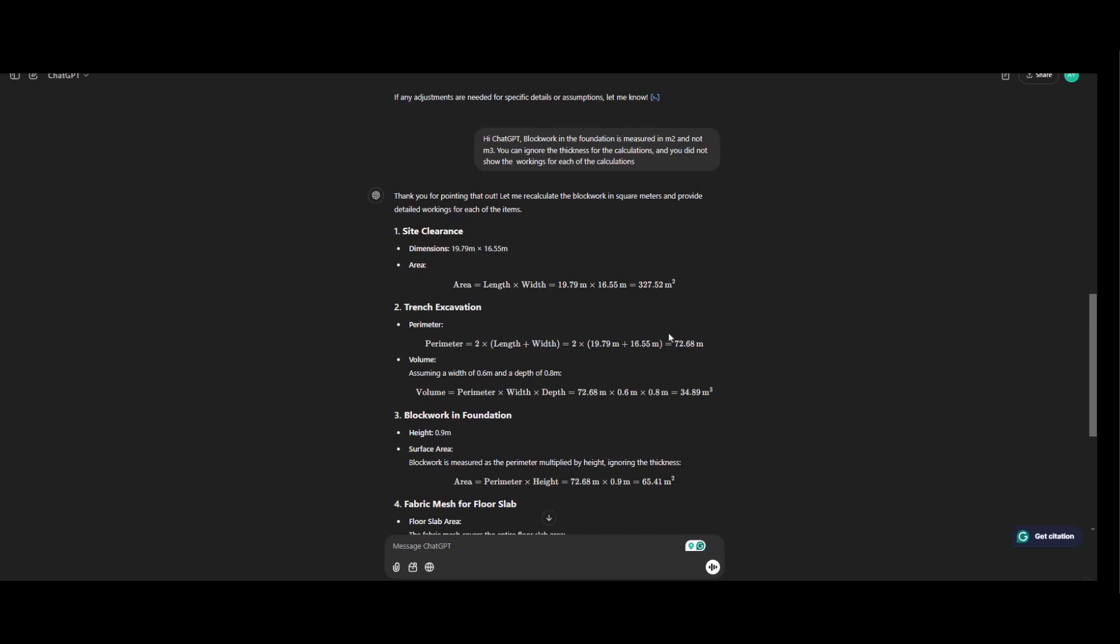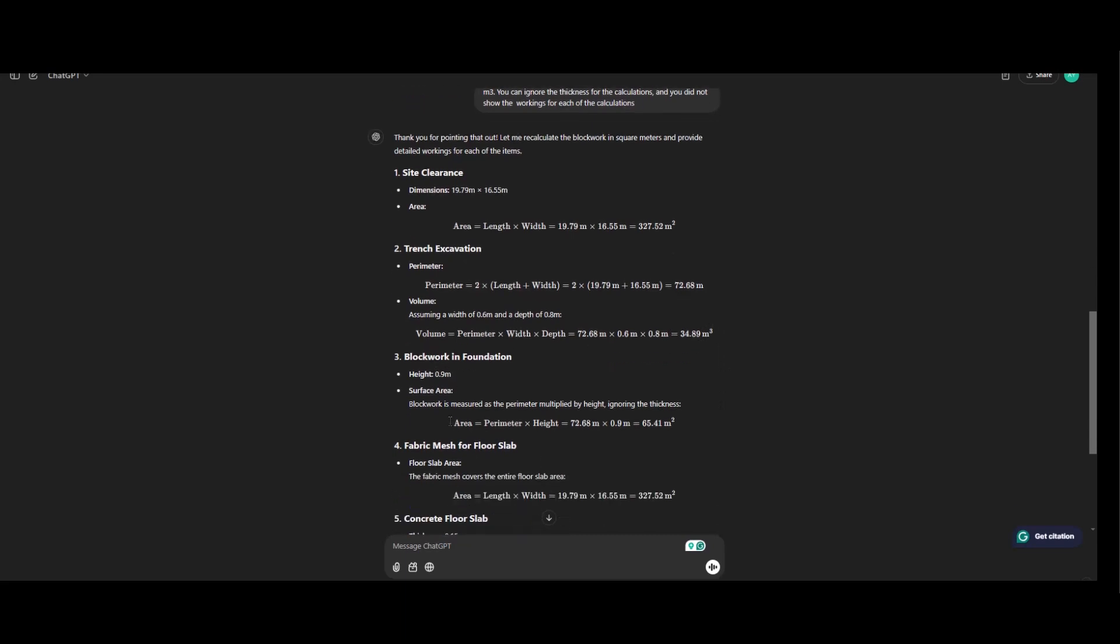However, ChatGPT has ignored that part, that's not a problem. So the volume equals to the perimeter of the width and the depth. So there is an assumption of 0.6 meter instead of the 0.675 that we normally use. So this is the assumption here. And we have the depth 0.8 and this is the total quantity.